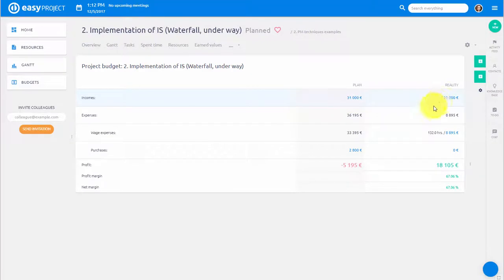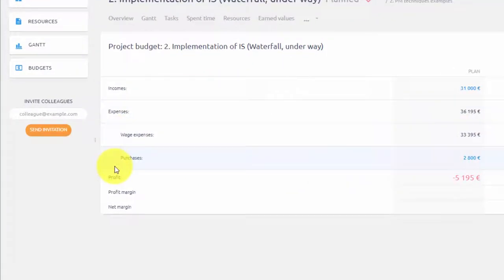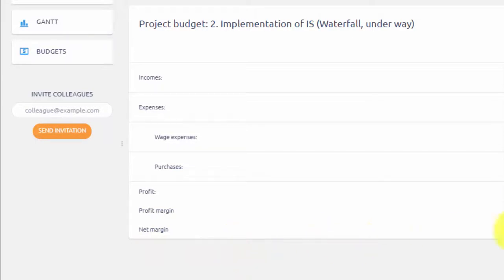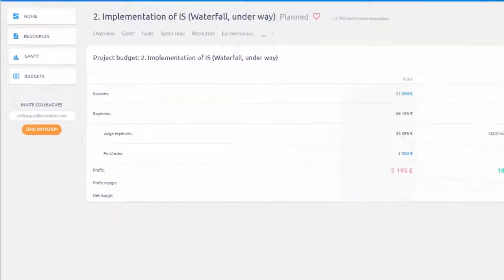Rows show planned and real incomes, expenses which are split into purchases and wage expenses. Here you also see overall profit, profit margin and net margin.